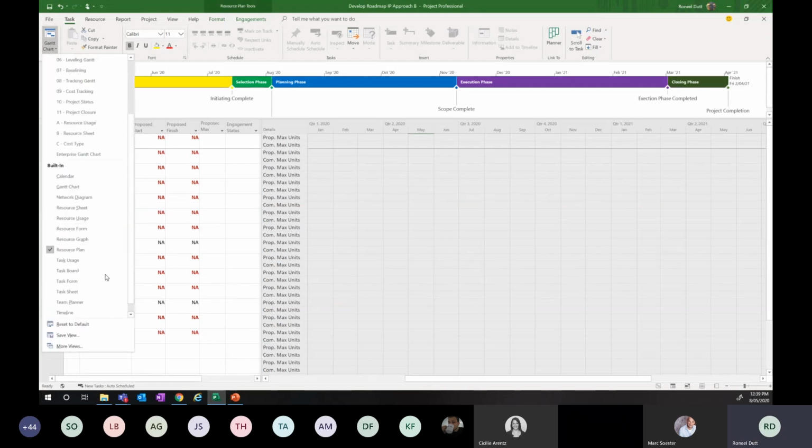Adding to that, the resource plan is created using the enterprise resource pool, which ties in with the first question we had, and which is also something you wouldn't get if you are using Excel-type functionality. Having an enterprise resource pool to plan your resources from one centralized point allows you to get the perspective on where your capacity and demand for resources as an organization sit. And therefore, that feeds back into the resource plan.